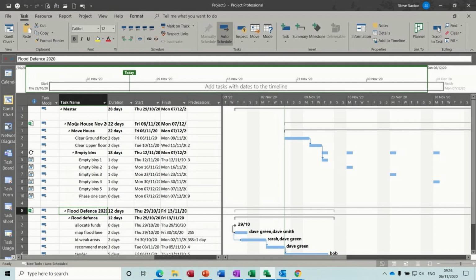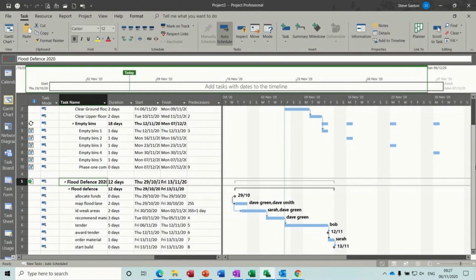What you're doing here is you've created a master file, but you can actually work on these projects through this master file. But you can also work on these projects in isolation by just opening the source file and working away on it. Because this is a live link, any change made at either end will be reflected at the other end. Now if you want to link files like this in a master file, you can do between projects.